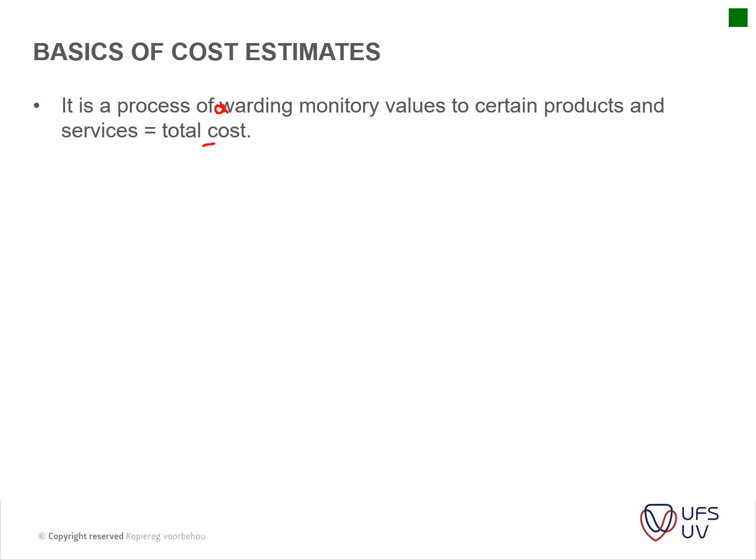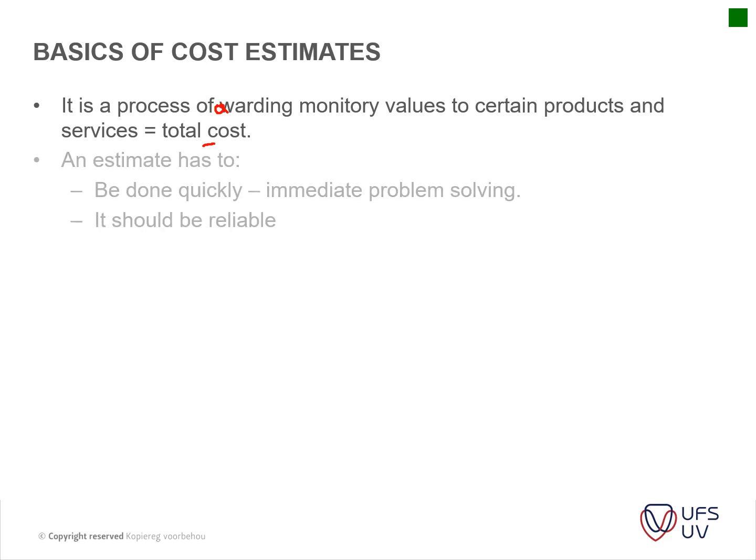Now, there are always additional costs that the client has to be aware of, like for instance the fees, VAT that has to be added, external works, payments of loans, etc. Usually payments of loans we're not too involved in, that is for the client. But there are establishment costs, connection fees to the municipality, etc. An estimate has to be done quickly. Immediate problem solving is needed, and it should be reliable.